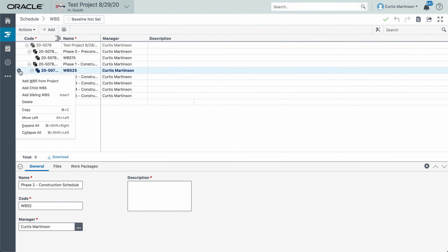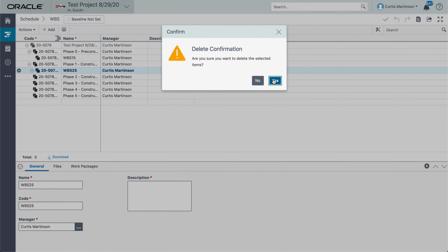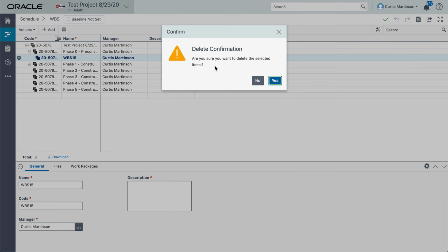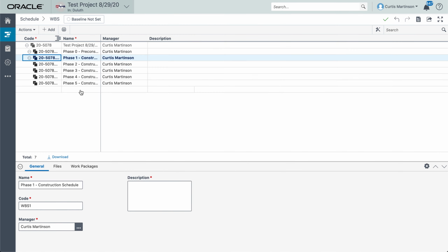If you have items on the list that you want to remove, such as this template here that I had made, these generic ones to start out with, in order to eliminate items underneath a phase, you have to ensure that there isn't any activities underneath that phase.